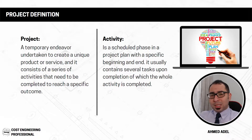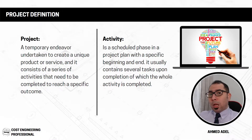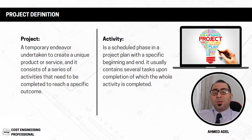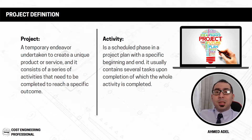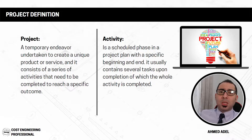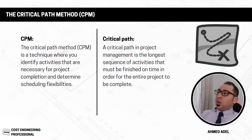To do the formwork activity, the tasks might include: measuring the levels of the slab and beams, erecting the scaffolding, and placing the plywood. Once the plywood is in place, the formwork activity is completed and the next activity can start — for example, steel reinforcement for the first floor slab. In Primavera we work at the activity level, not the task level, since tasks are smaller portions of an activity.